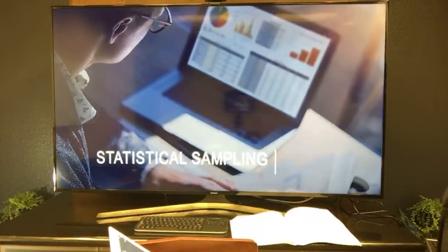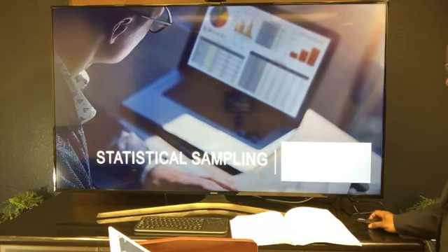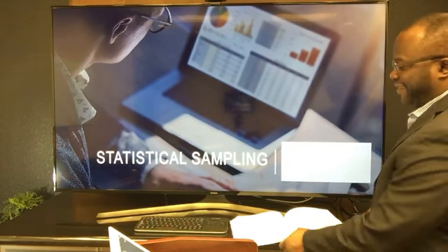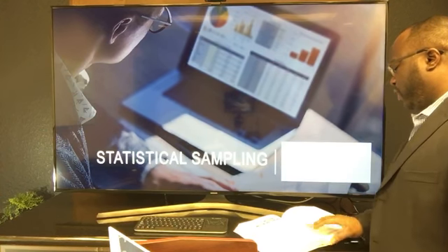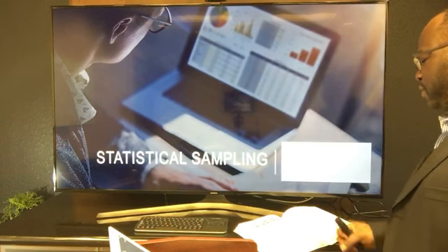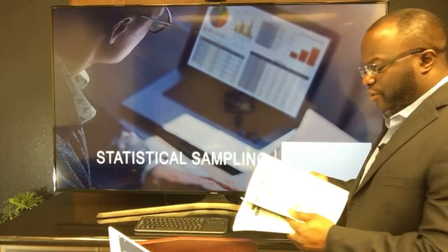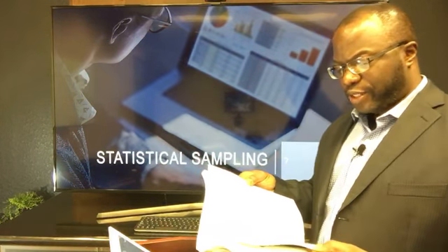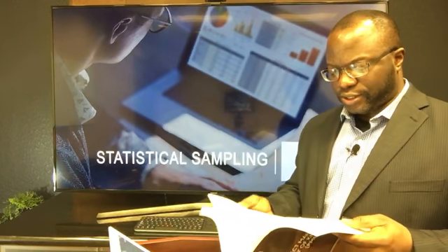Statistical sampling, tool and technique of what? Where do you find that being spoken about? Is that explicitly mentioned somewhere? Is it explicit? Figure 8-1 has the answer. So under 8.3, under the tools and techniques, statistical sampling is going to help you where you got a boatload of stuff to inspect, isn't it? And you choose part of the population of interest at random for inspection. And this is also talked about in 8.1.2.6. So let's go there.